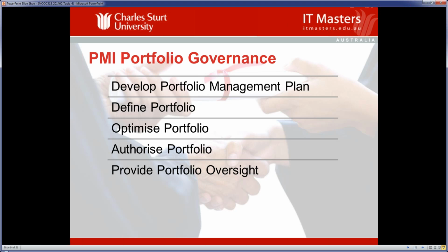Portfolio governance is the mechanism that's required to ensure that that is carried out down the stream. That could mean that some poor project manager somewhere has just had their project cancelled or cut in half. Stuff like that happens because portfolio governance has got bigger things to worry about. And they have decided that, yeah, sure, at the project level, it's an enormous waste of money. But not doing that might waste even more. And that's a perspective that that project manager just can't see. They just don't have the visibility to those facts to make those kind of judgments.